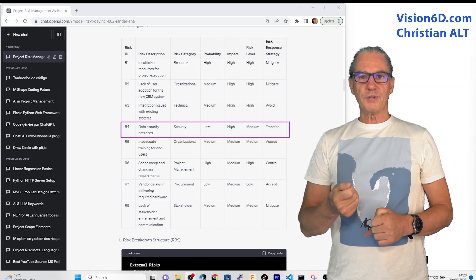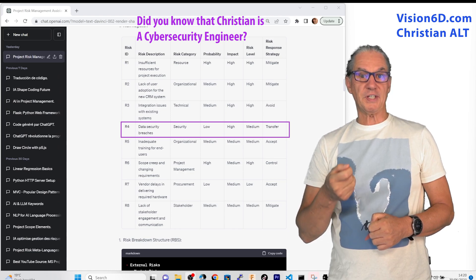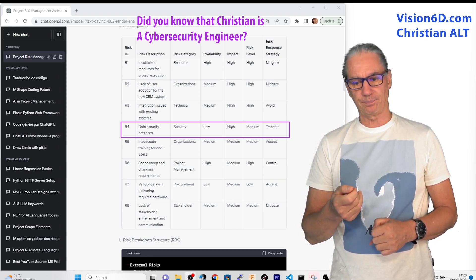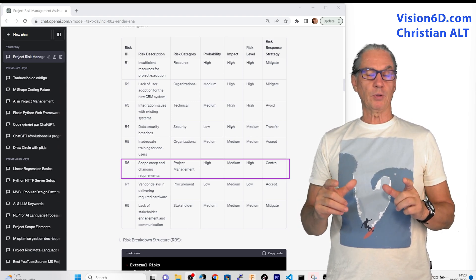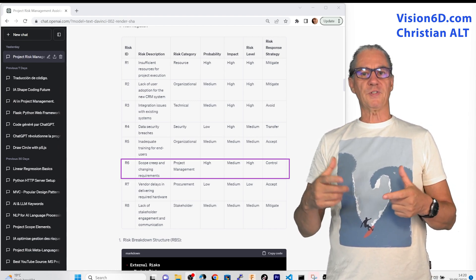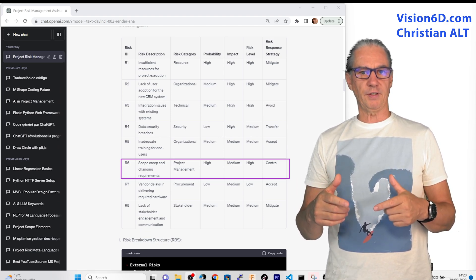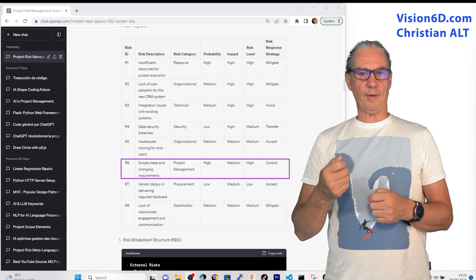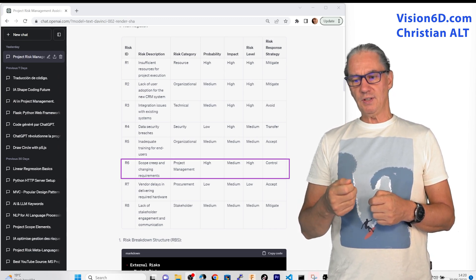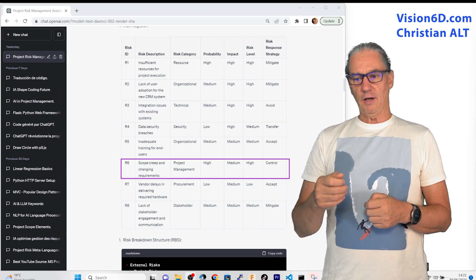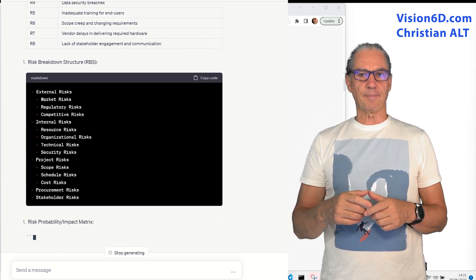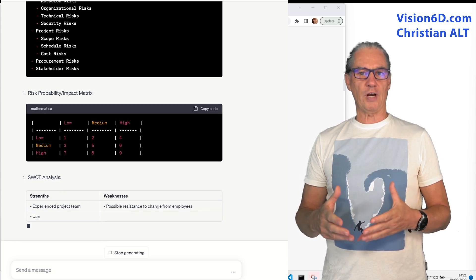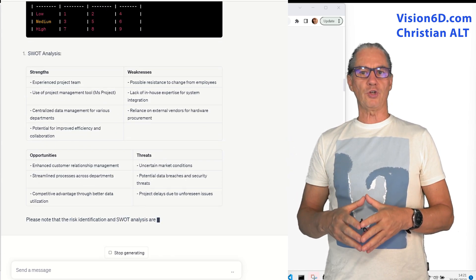It will also make you aware of the risk of data security, that is to say also cyber security of your system. One point that I still want to mention is the scope creep. The scope creep, it's when you have defined a certain scope but you have stakeholders that want more than what was defined and of course the consequences of such behaviors are really dramatical for a project. So here you see that the probability is high, the impact is medium, the overall risk level is high. I let you consult the rest of the table and the other diagrams too to see what ChatGPT generated according to the context of the project we described.